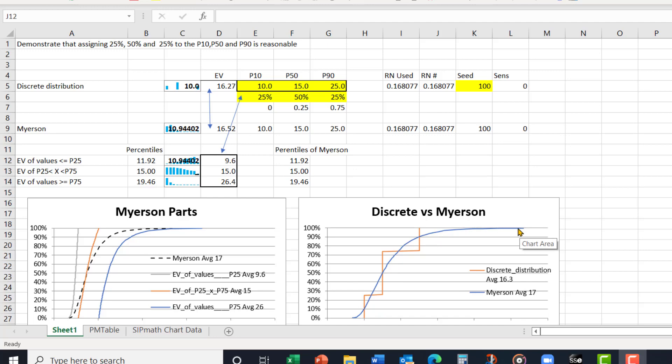Now here's what I've done. I've separated the Myerson distribution into three components: those values that are P25 and less, those values that are 25 to 75, and those values more than 75, and calculated those expected values. And they are shown here.